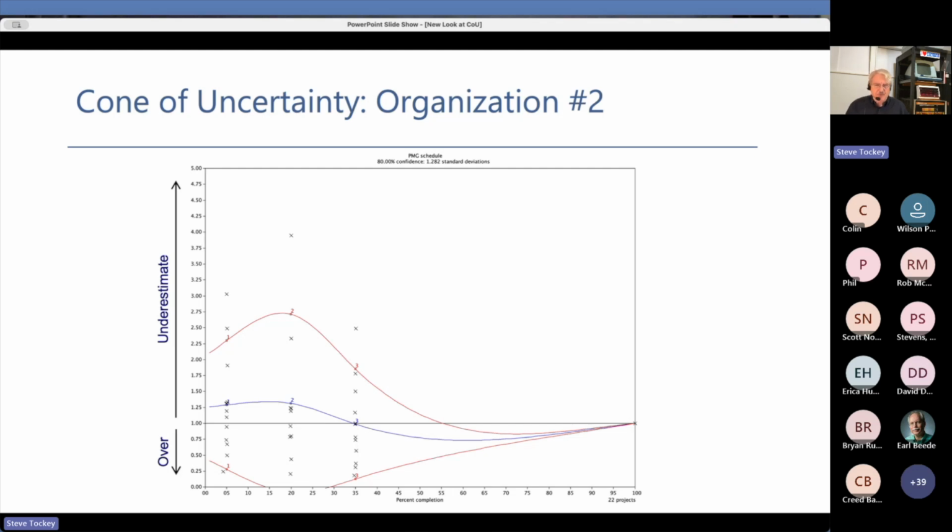He says the first estimate on the project and the third estimate on the project are done by the tech lead of the project, okay? The second estimate is done by marketing. And so the point here is to say, well, look, marketing's estimate is pretty much crap. Whatever marketing is estimating is a worse estimate than the tech lead's first estimate, and you should probably just ignore marketing's estimate as being irrelevant.